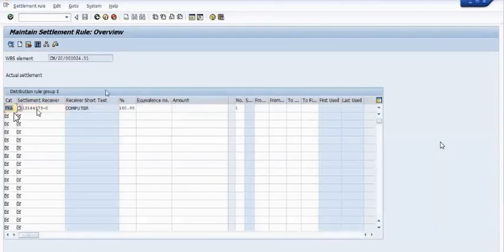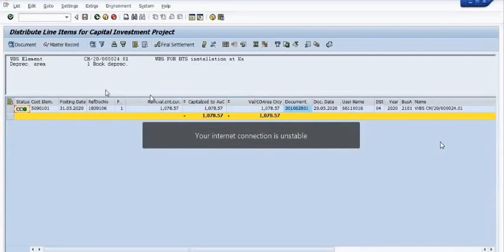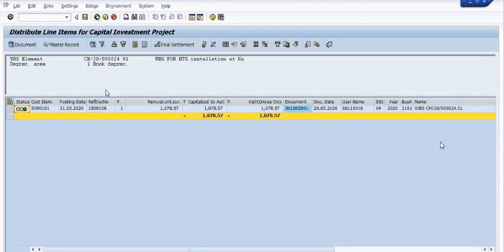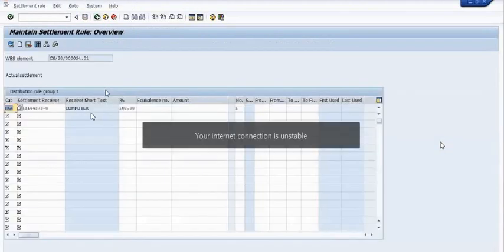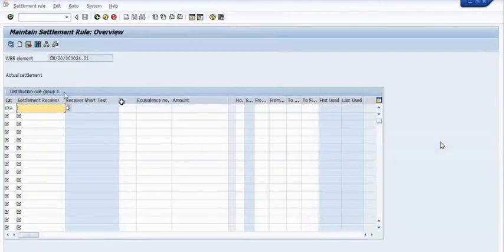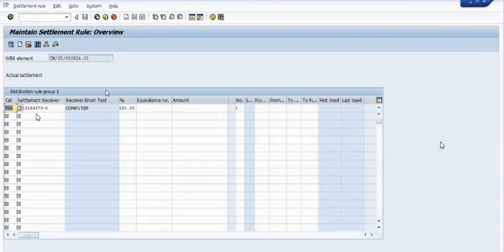This is the fixed asset — you need to choose the category fixed asset. We have selected the category fixed asset and filled the asset ID, receiver short text 'computer', and 100 percent.